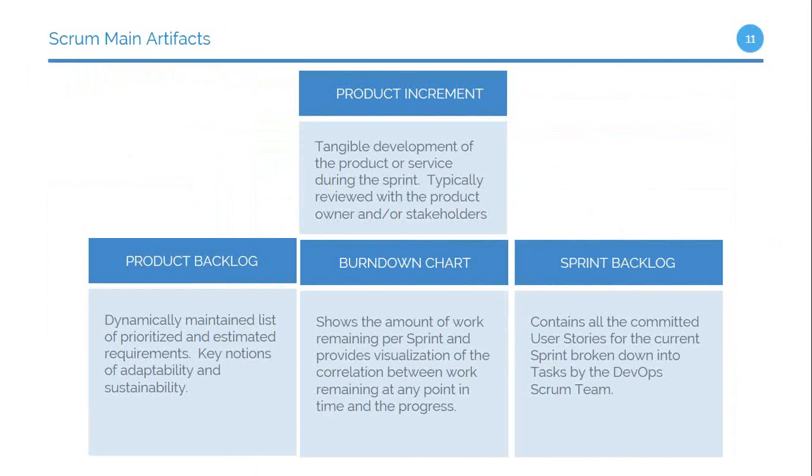And if you tell me 13 2-week sprints, and that means basically 6 months out, fine, that's okay, as long as I've got that much time. If it's not, then I want to know up front, and that allows me to do better in terms of being able to react, to be able to be proactive.